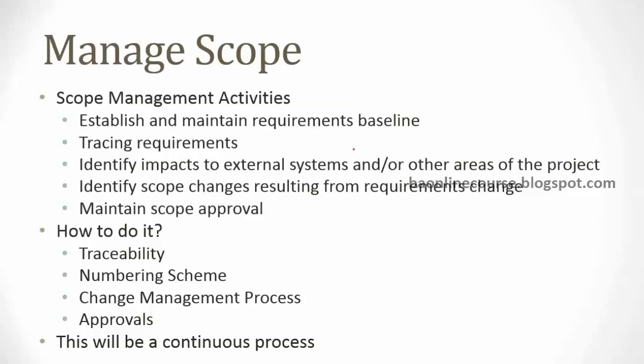So you cannot enforce your baseline and your change management unless you have taken the formal approvals from the customer, right? So the customer could come back and say, I didn't even approve that requirement. Why did you develop it? Now do it my way, right? So you need to have that formal approval from the customer, you need to have that commitment from the customer saying that we have agreed on this way of managing the scope. We have agreed on this requirement, right? And this is exactly what you have to deliver, right?